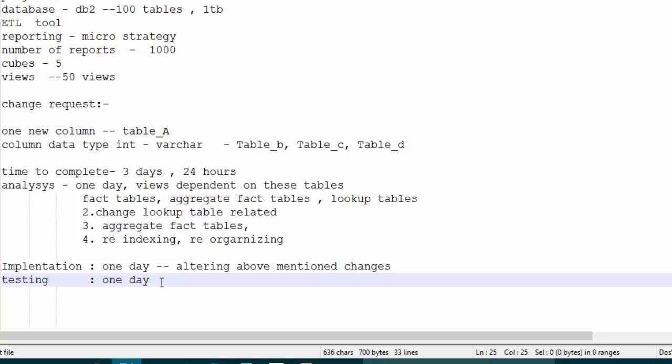Yeah. So a data modeler cannot say this is not my scope. Wherever data is being used, the data modeler has to interact with all the stakeholders. Because as a data modeler, I might not know about ETL. I have to sit with the ETL lead or the ETL person in charge of that particular project and say, these 2 changes they are asking, tell me how many mappings will be affected and how much time you need for creating, loading and testing, including data errors. While talking to the BA, we will tell that if your data is clean, we'll deliver it. If data errors are more, after data errors we need this much time. You will say 1 day for data errors, but they have to respond back, right?